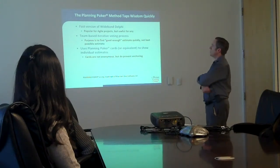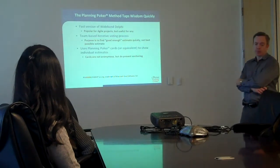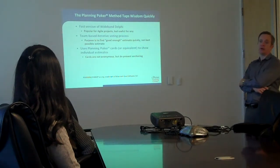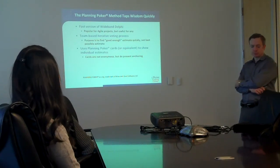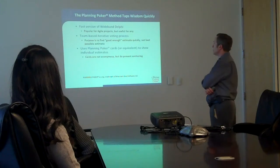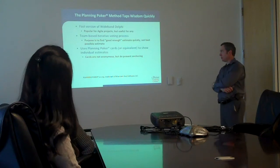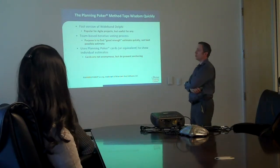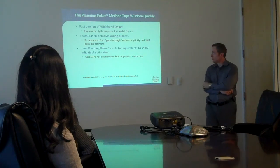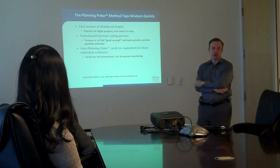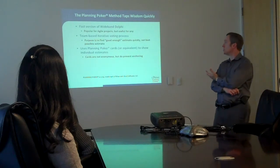The Planning Poker Method is a fast version of wideband Delphi. Like all the Delphi methods, it's useful for any project, although it is particularly well known and more widely used in agile projects. It's a team-based process, just like the others. Its purpose is to find something good enough fast — we're looking for good enough quickly rather than superb someday. We use cards to show our estimates, our estimated numbers, and our values.